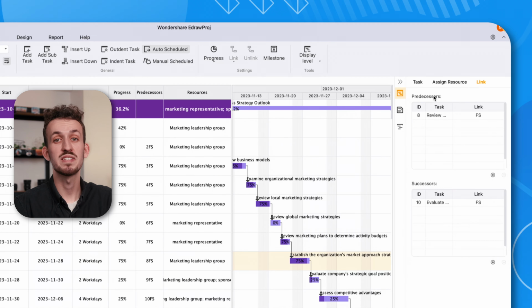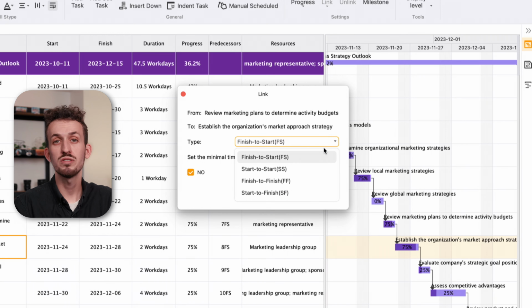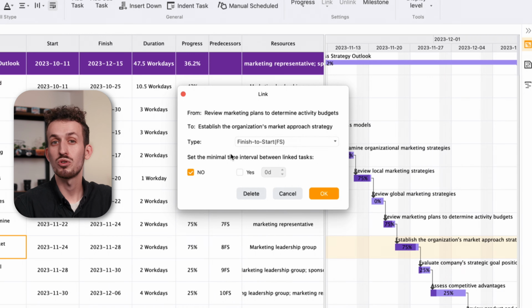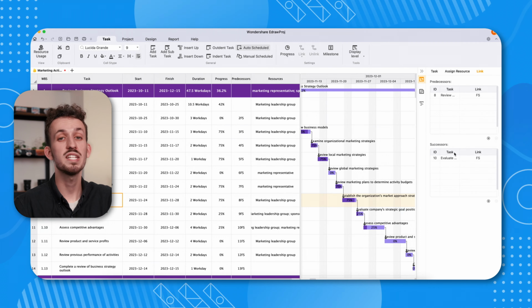Step 2. Now you need to double tap your progress status below the link column in the predecessors table. It will show you a pop-up screen where you can extend the drop-down list of type. From there, pick the FS option so that when the current project is finished, the next can be started immediately. You can apply other options according to your needs and hit the OK to confirm the changes. Step 3. Confirm the connection through the interlinked calendar located next to the main progress panel. The arrows in that calendar show that the completion of one project will initiate the next one.